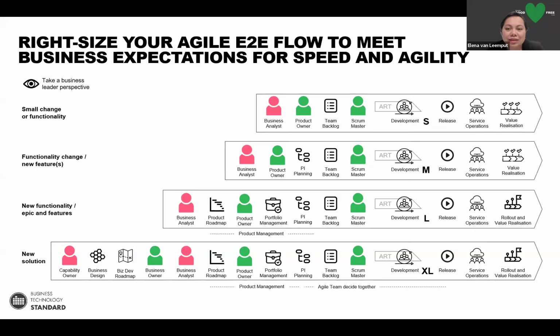So if the task can be completed in a few hours or a day, it's better to go through their own sort of customized approach or flow. So the governance model acknowledges that there are differences between small and big initiatives. And so this can be quickly addressed if there's a small one, smaller demands, and the larger, more complex ones may be, for example, multiple quarters, they can be going through a different approach.